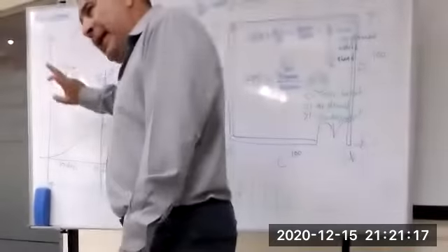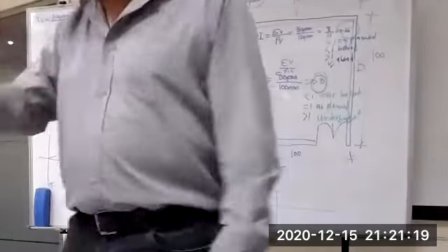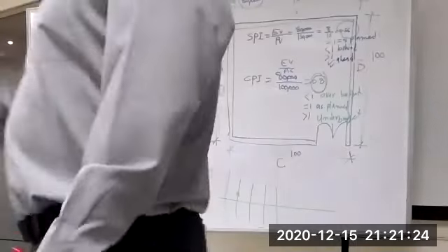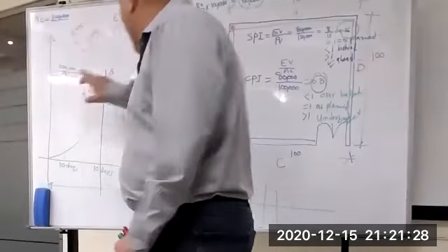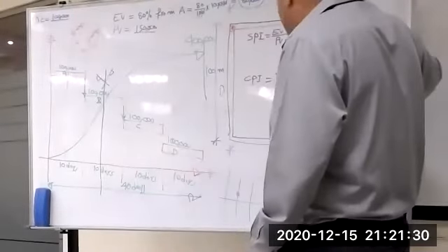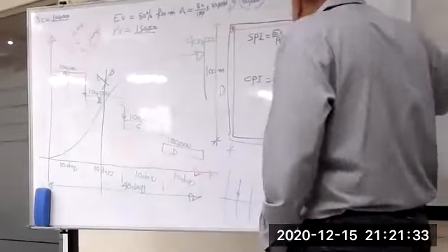Allocate skilled labor. Give more salary. No big deal. Give more salary, allocate. And at the same time, when you are working in this direction, you are already working on A, work at the same time tomorrow for B.